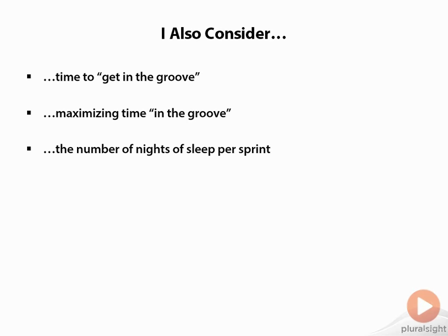And how many times have you woken up in the morning after a good night's sleep and you realize that you've got the solution to this problem that has been bugging you for a couple of days? That's because your brain was churning on it while you were sleeping. That is valuable. And if you've only got 4 nights of sleep inside of your sprint, you might be missing out. If you've got 12 nights of sleep inside that sprint, maybe you're actually going to get more creative solutions out of your people. My personal preference on sprint length is 3 weeks. I think it's a good mix between too long and too short. It's just kind of a happy medium.